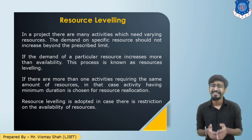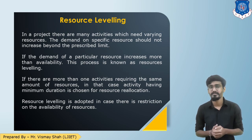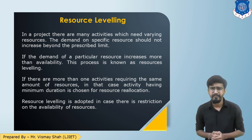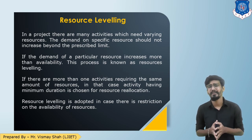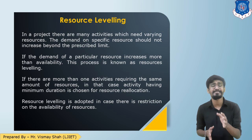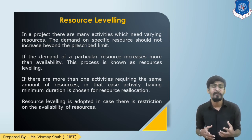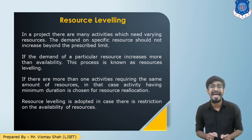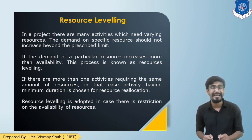In a project, the activities may require a varying number of resources. The demand on specific resources should not exceed the availability of those resources. If the demand for a particular resource exceeds its availability, then we have only one option: to delay the activity which has the maximum float. That process is known as resource leveling.